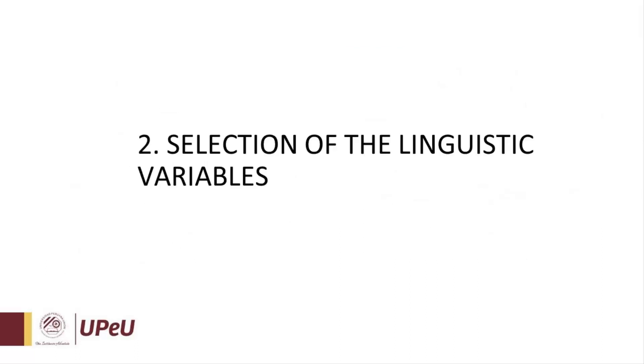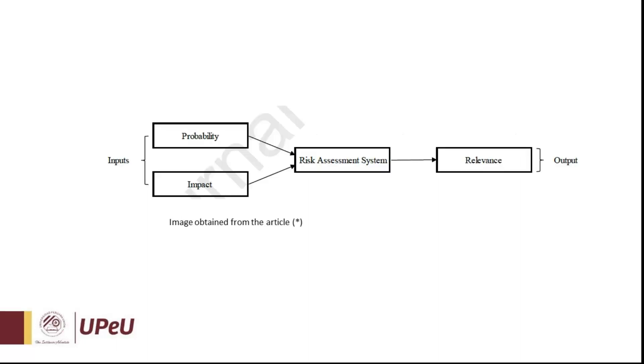Step number two: Selection of the linguistic variables. In this case, we have two inputs, probability and impact, that will be inserted into our fuzzy logic system for risk assessment, and we've got relevance as an output.